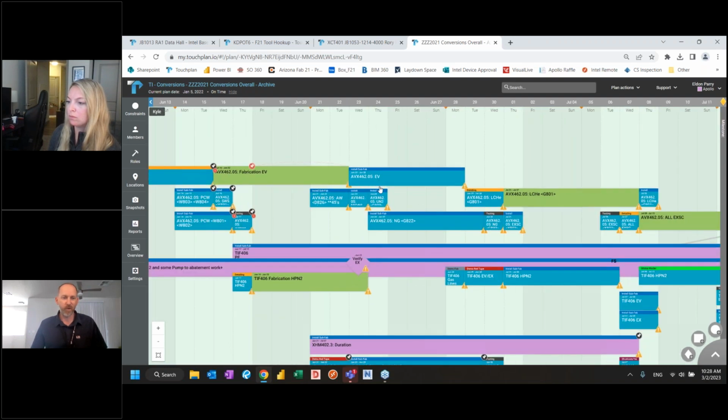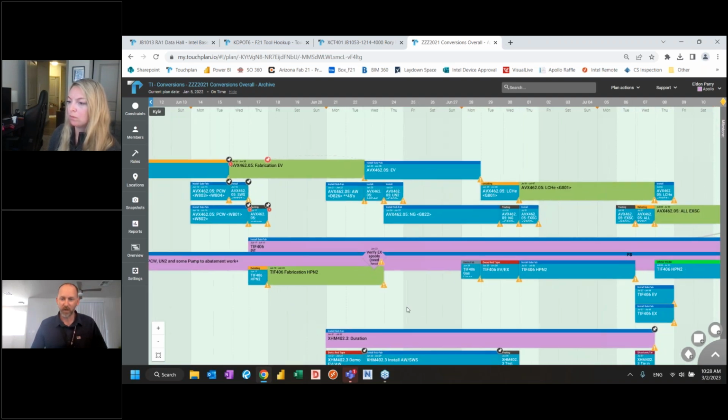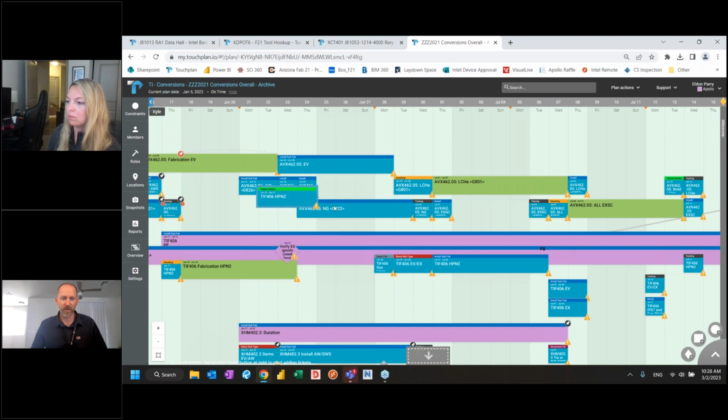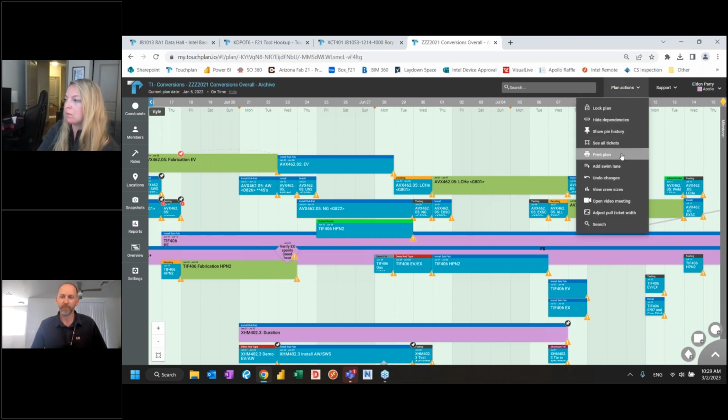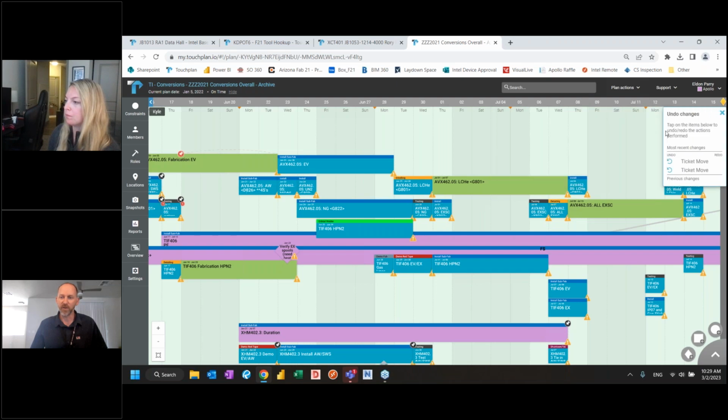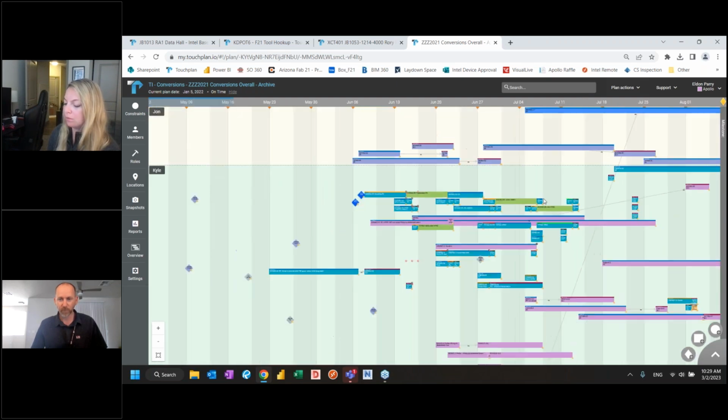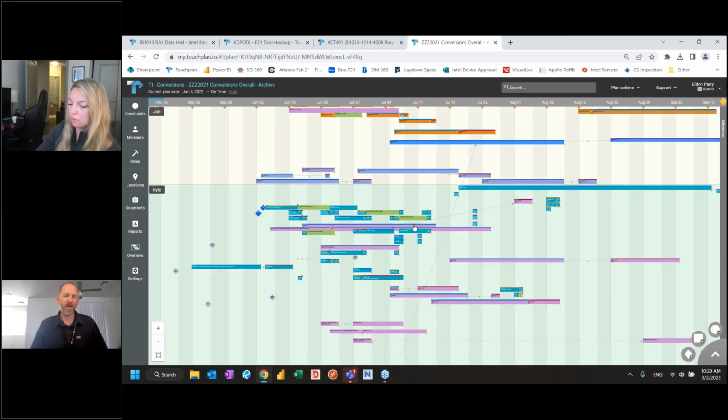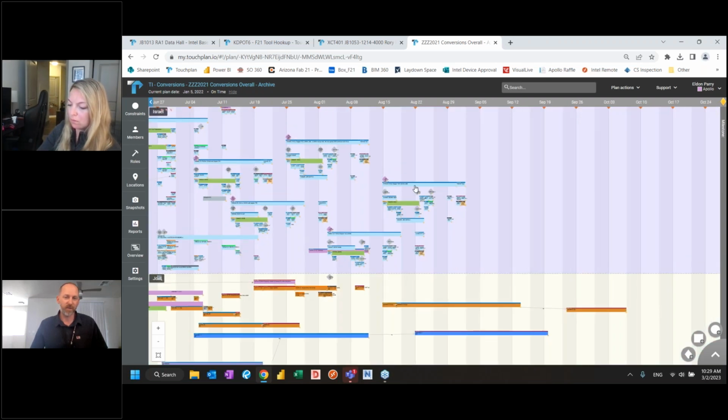So if somebody was asking me, hey, we want to work on, I don't know, they want to pull this task into here, something like this, we can quickly talk through, okay, well, if you wanted to do that, that's going to push these AVX 462 activities we had planned. We can do that, and we can start talking with the client on exactly how to execute that. And that's where often this gets used, in that type of atmosphere, because it does change a lot.